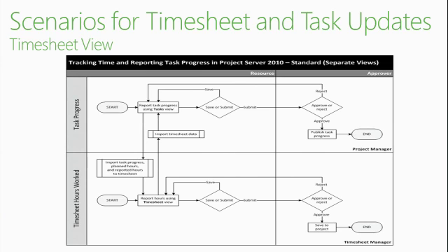And on the other side, the task view, you may decide to import the hours that were entered in the timesheet so that you don't have to retype them with the risk of errors that you have. And then you will do the same thing. Basically, you will save, submit, and then the records and the updates will go to the project manager or the timesheet manager for the timesheet to be approved and to be saved in the project for the project manager and so forth.